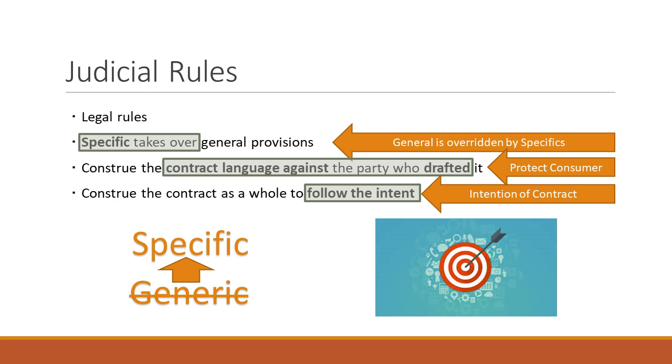Specific, you follow before general. So again, the more detailed over the more expansive. So you follow the specific. And if it's between paragraph A and B, the courts will enforce the more specific provision.